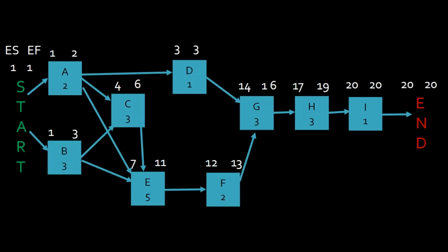No. On H, that's standalone, sir. It starts on day 17. 17 is a day, you have to count it. 17's a day, 18's a day, 19's a day. That's your 3 days. Believe me, you can look in the PMBOK and you're going to see that this is exactly how they calculate the days.